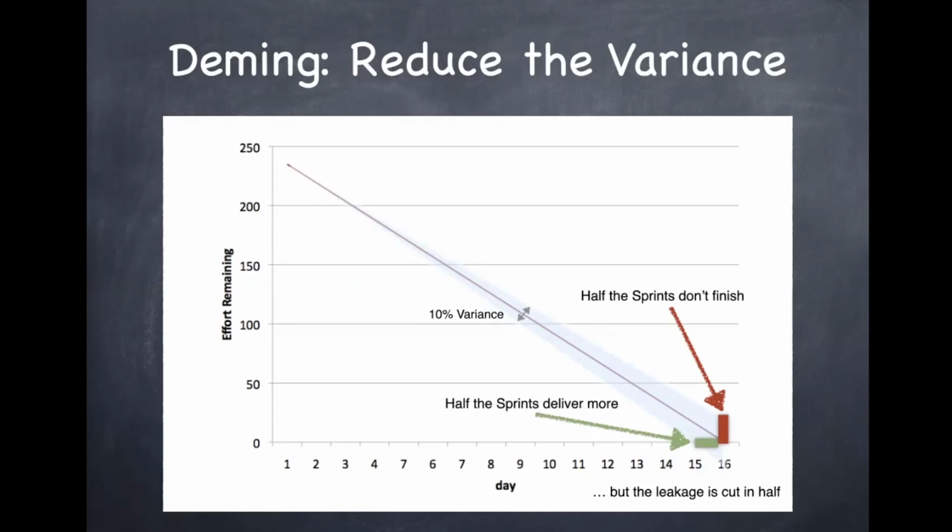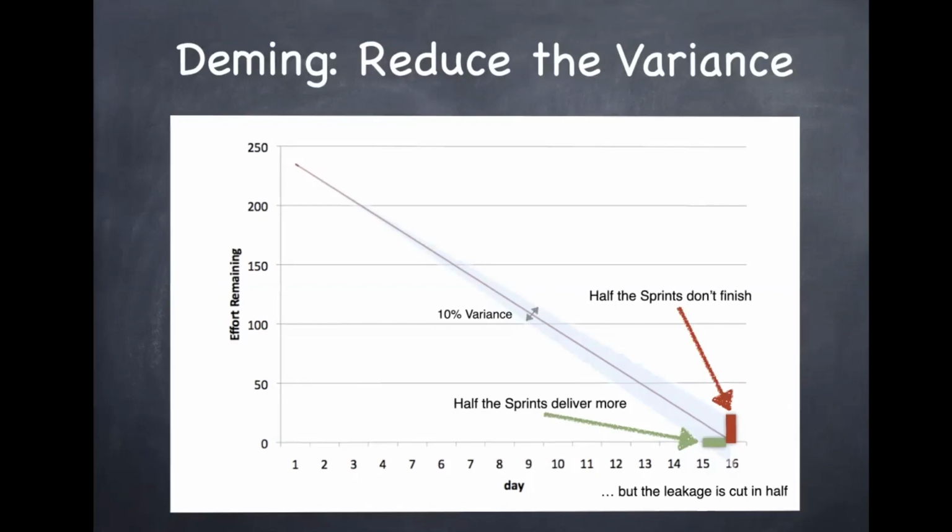Now, in fact, you don't get points for completing everything on the sprint backlog. The goal of a sprint is to complete the sprint goal. If you are looking at it by counting PBIs or things finished on the sprint backlog, you're a feature factory and you don't understand Scrum. We'll talk a little bit more about this later.